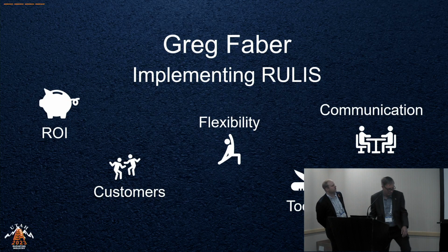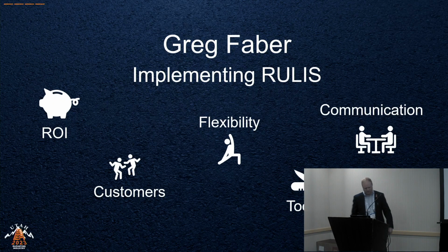There we go. So one of the ways that, as we were developing the purchase order for RULIS, the right-of-way utility leasing information system, was we're looking for a return on investment. In the slides, I'll show you what we had before and the direction that we're headed, who our customers are. To give you an idea, in Texas, in our previous system, which was the utility installation review, there were 30,000 users over the 16-year lifespan. Over 350,000 permits were submitted. So on a per year basis, we're looking at anywhere from 25,000 to 30,000 permits a year, utility permits within the right-of-way.